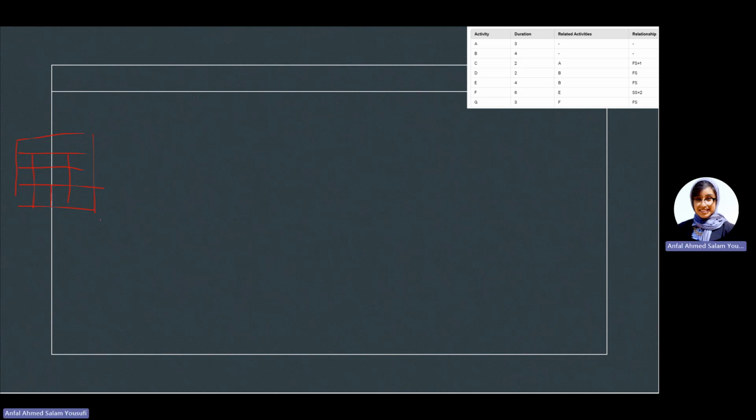So I'll be doing this for every activity. So let's start with activity. So the first thing we have, as how we did it in ADM, is we need to have a start activity. Okay, so from start activity, we have two activities with no relation. What does that mean again? Meaning we're going from start directly to these two activities, which is in here A and B.